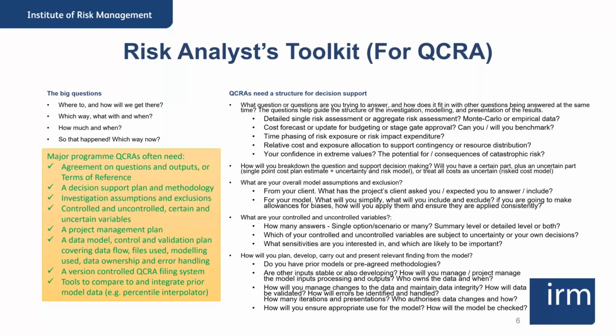And things iterate, particularly if you're working on a major program where people are working out their scope and schedule and cost at the same time. Other things are changing around it, so it's very likely you'll be working in an iterative environment. So you need to have good version control. And then you need the ability to compare the current model with previous models as well.